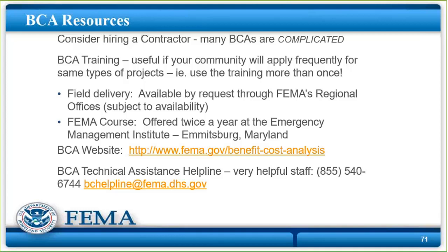Now I'm going to go back up to the second line. If you are going to be applying for the same kind of project for several years in a row, like you know you're going to be doing a lot of flood elevations, a little bit at a time, it's worth somebody in the community learning how to do the benefit cost analysis. If you're not, if you're going to do flood elevations this year, next year we're going to do generators, next year we're going to do a seismic retrofit, it is not worth your time to learn how to do this because you won't remember it the next year when you go to do the different module. I will tell you that all the infrastructure retrofit projects that we see, water lines, sewer lines, roads, etc., contracting consultants do the BCAs because it's the only way to figure out how to use the damage frequency analysis without royally blowing it up.